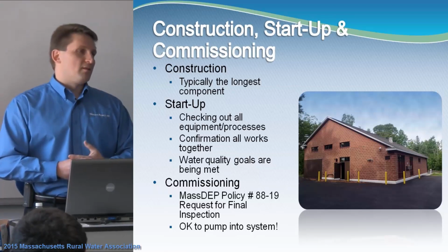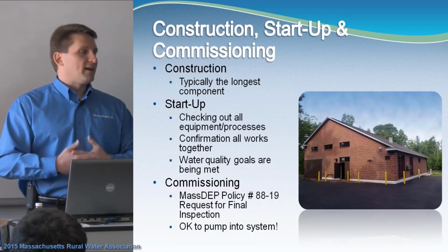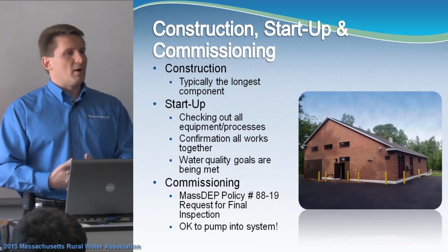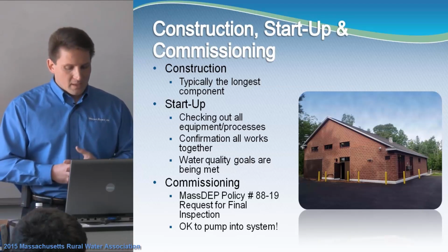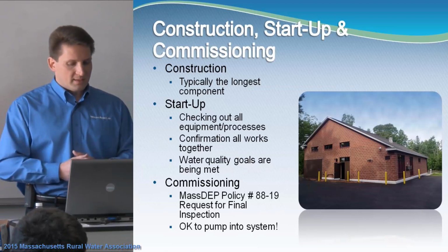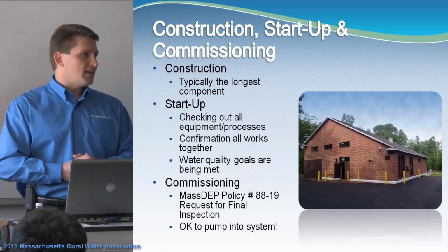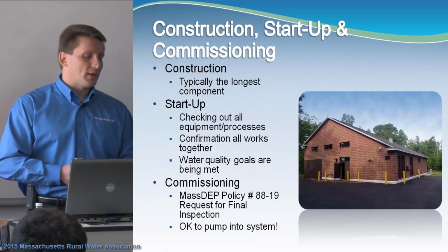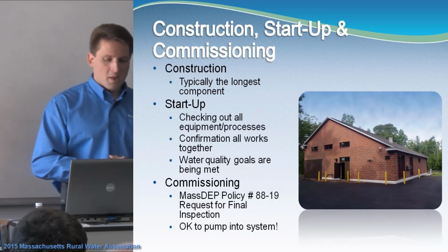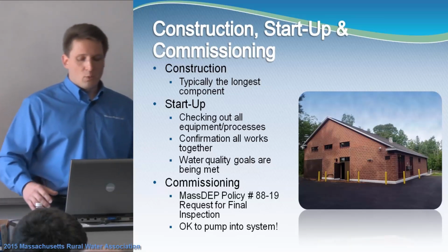They do have the formal process of a request for the final inspection. They'll come out, they'll check out the facility, make sure it's built to the standards that they require, and ultimately after that point you'll get the okay to pump into the system and you're ready to go.